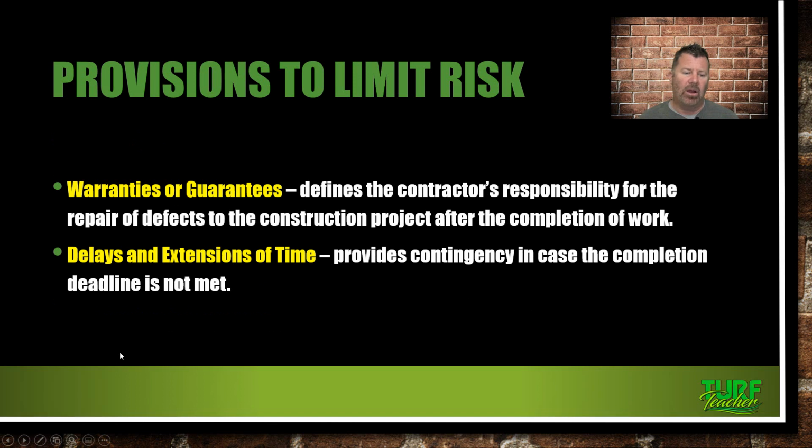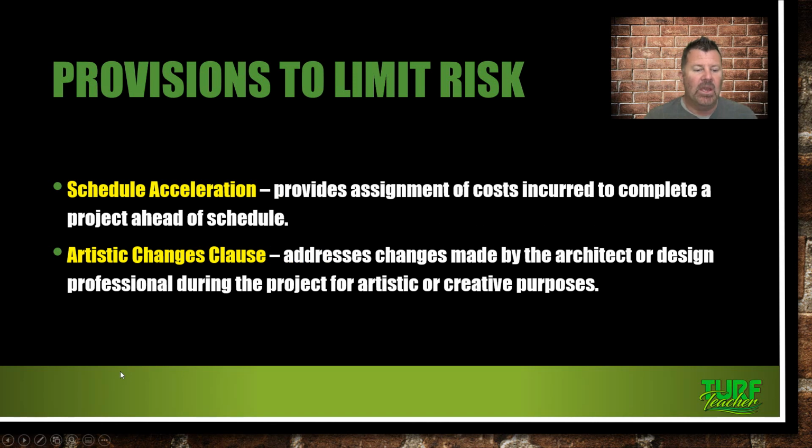Warranties and guarantees define the contractor's responsibility for the repair of defects to the construction project after the completion of work. Delays and extensions of time provides contingency in case the completion deadline is not met. And sometimes if you don't meet that deadline, you might be having to pay some fines. Schedule acceleration provides assignment of cost incurred to complete a project ahead of schedule. Maybe you'll get some extra money.